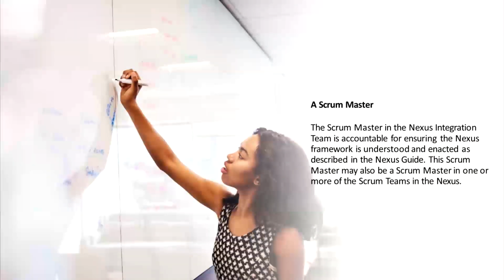A Scrum Master. The Scrum Master in the Nexus integration team is accountable for ensuring the Nexus framework is understood and enacted as described in the Nexus Guide. This Scrum Master may also be a Scrum Master in one or more of the Scrum teams in the Nexus.